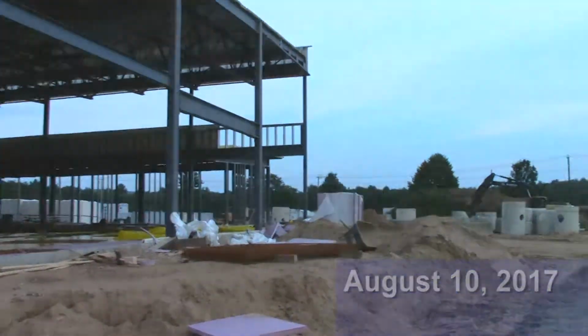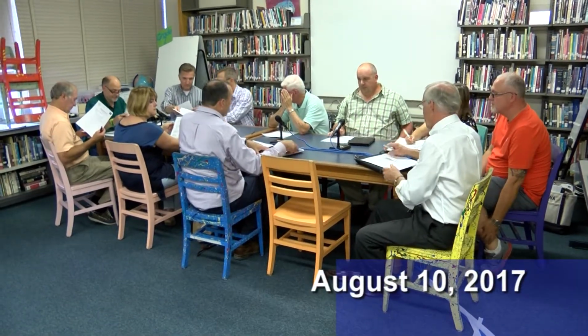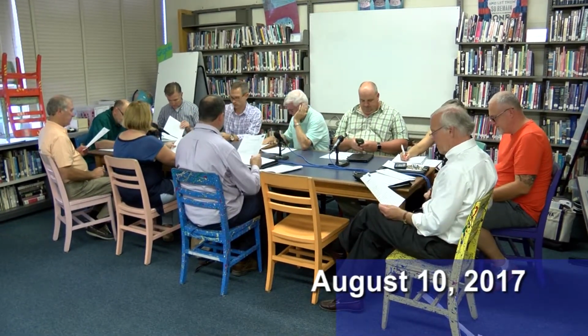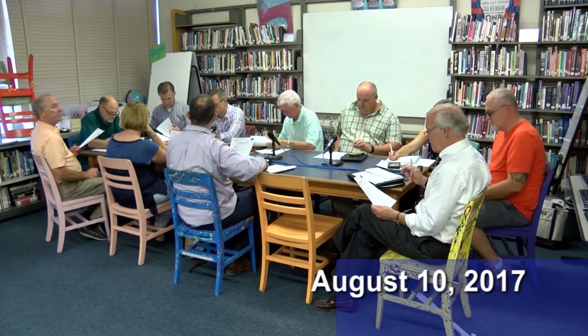Everybody ready to begin? Okay, we'll go right to Collier's for our update on the project. Okay, thank you, Mark. So as you can see, a lot of activity going on the site, inside the building, in addition, inside the kitchen and cafeteria. Just quickly, recent activity on the site is prepping for the paving. As I mentioned, the paving is scheduled to take place this Saturday, weather permitting, but it looks pretty good. A little sprinkle, a little rain isn't going to hurt it. If it's an all-out downpour, then that could be a problem. But right now things look good.